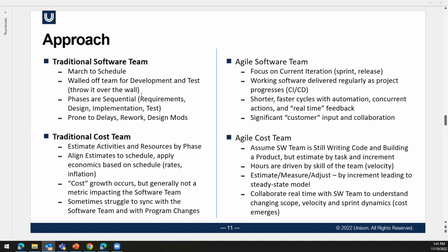So as you're in that period of time planning the next sprint or the next release, take some time to look where you've been, readjust, and measure or estimate for the next one, but don't go 3 or 4 into the future, because you may not regress to the point you can trust. You have to be as flexible as the team that's saying, well, this time I'll do these backlog items because I think I can fit them in and arrange it. So you're talking much more on the basis of iterations and releases than working with the Scrum team on actual sprint by sprint. And that makes a lot of sense.